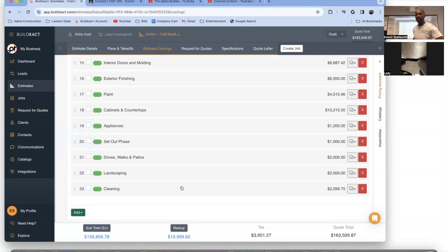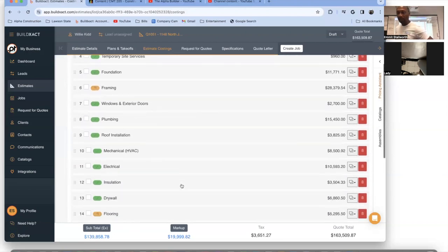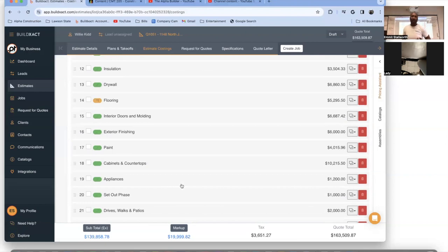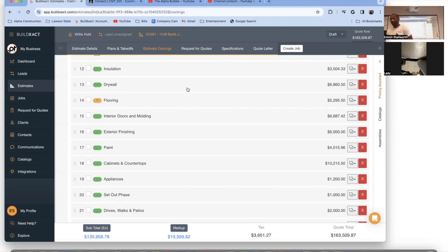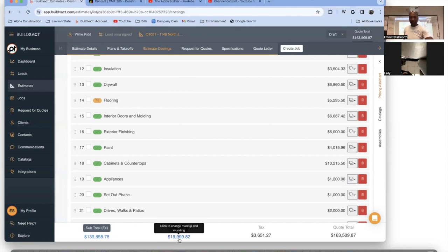I'm showing you guys that you need to know what's involved. The reason I can quote things out the way I do is because I know what's involved. If you overlook one of these line items — like my friend did — let's say you overlook the drywall line and miss $6,800 to $7,000. When you're doing that job, that money has to come from somewhere. And you signed a contract, so it comes out of your profit.